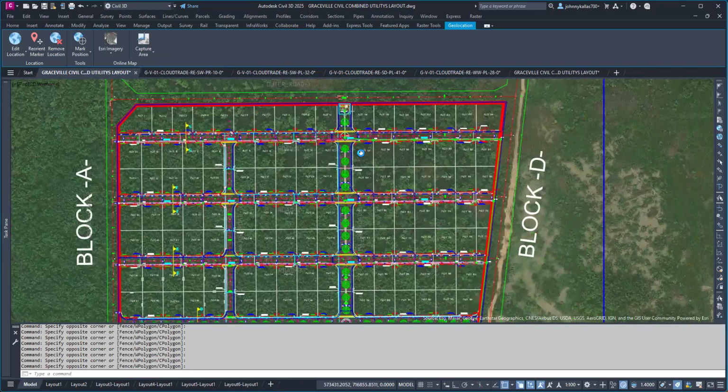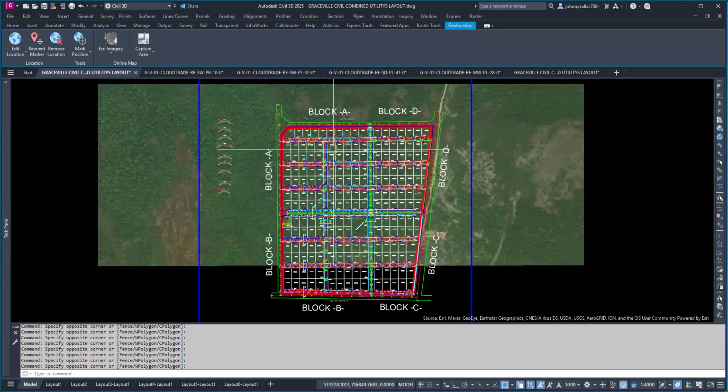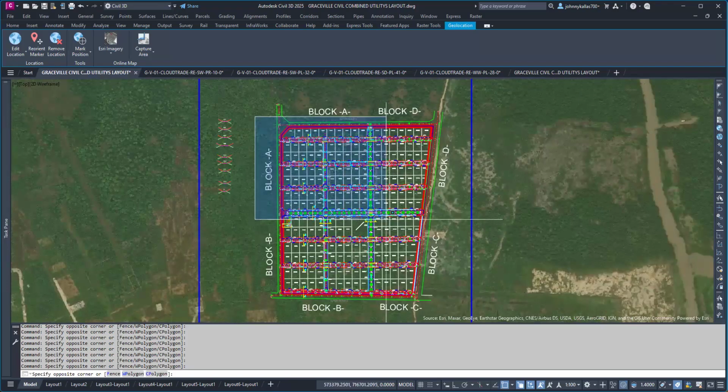But if you want to do it as a block, it can be, but it's much better to do the road without the infrastructure, without the utilities, with the dredger, to do all the road with the dredger. And for the utilities, it can be block by block. Okay. All right. Even with the dredger, it can be, but it's much better to do directly with the dredger the whole road. Okay. All right. Yes. Thank you. Thank you, sir.